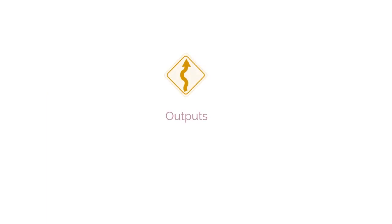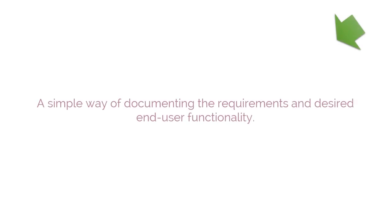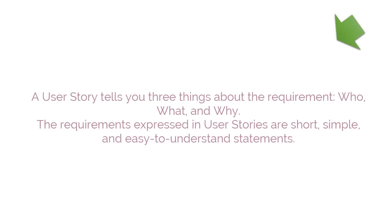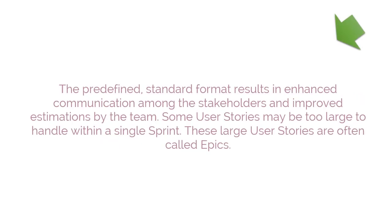The mandatory outputs of this process are user stories and user story acceptance criteria. User stories are a simple way of documenting the requirements and desired end-user functionality. A user story tells you three things about the requirements: who, what, and why. The requirements expressed in user stories are short, simple, and easy to understand statements. The predefined standard format results in enhanced communication among the stakeholders and improved estimations by the team.